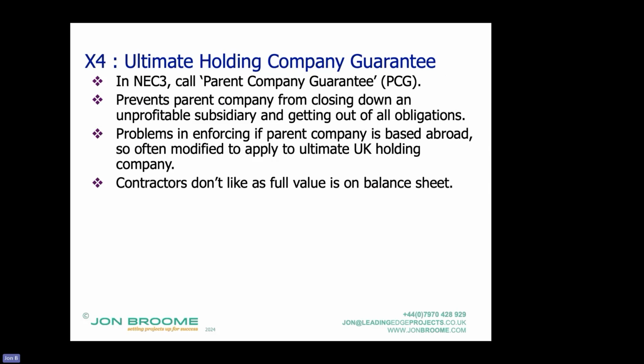X4 is ultimate holding company guarantee, and in NEC 3 it was called the parent company guarantee. So what's this about then? So what the parent company's guarantee does is the parent company of a subsidiary effectively says, I underwrite any expenses you incur on this contract if this subsidiary closes down.